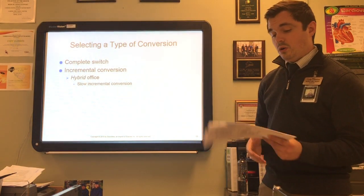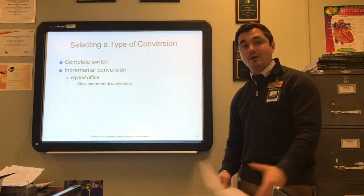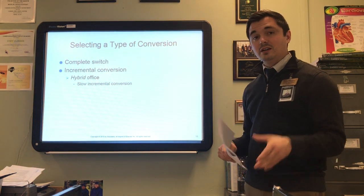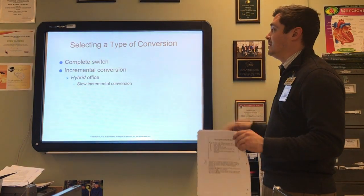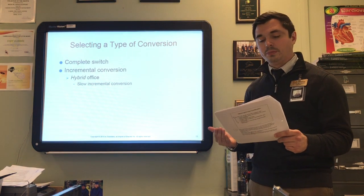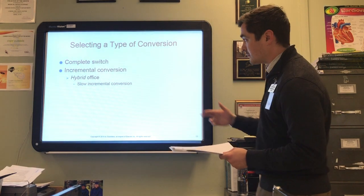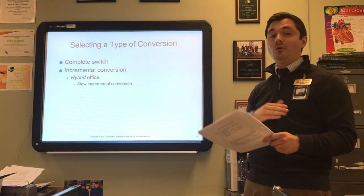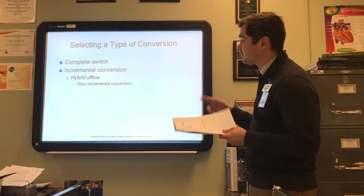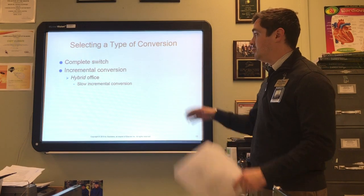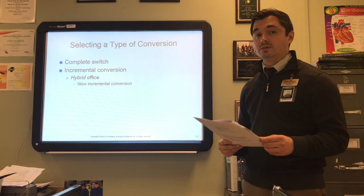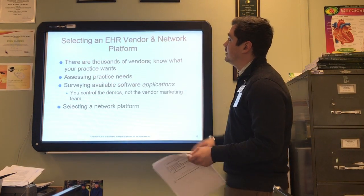When converting from paper to electronic medical records, you need to select the type of conversion to implement. Options include a complete switch — scanning all old paper records into electronic health records — or an incremental switch such as a hybrid office, where existing patient charts are kept on paper and only new patients are entered into the electronic database. There is also a modified hybrid approach where new patients are in the EHR system while old patients are gradually converted until there are no more paper records.